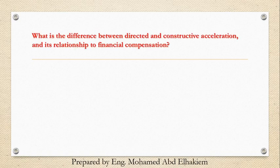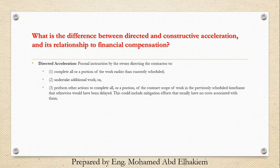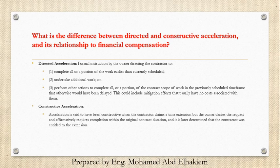What is the difference between directed and constructive acceleration, and its relationship to financial compensation? Directed acceleration: a formal instruction by the owner directing the contractor to (1) complete all or a portion of the work earlier than currently scheduled, (2) undertake additional work, or (3) perform other actions to complete all or a portion of the contract scope of work in the previously scheduled time frame that otherwise would have been delayed. This could include mitigation efforts that usually have no costs associated with them. Constructive acceleration: acceleration is said to have been constructive when the contractor claims a time extension but the owner denies the request and affirmatively requires completion within the original contract duration, and it is later determined that the contractor was entitled to the extension.